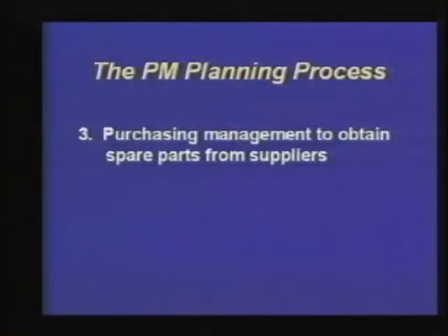And when I say pick up, it's actually being recorded. And if there are no spare parts available, then the purchasing system supports the inventory system through the procurement process with the vendor supply base. The date in item number 1 or step 1, when we plan that particular order and we attach a scheduled date, is going to have to be addressed in both the inventory and the purchasing activities.